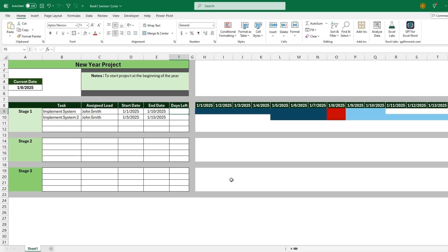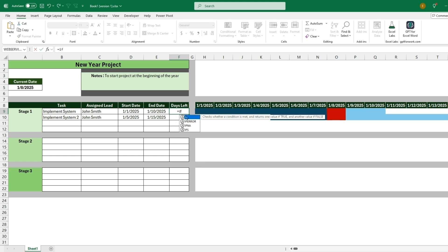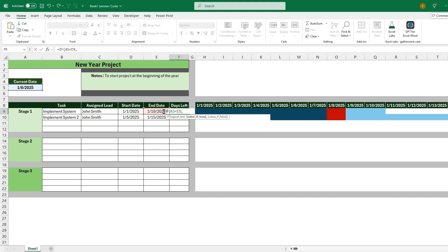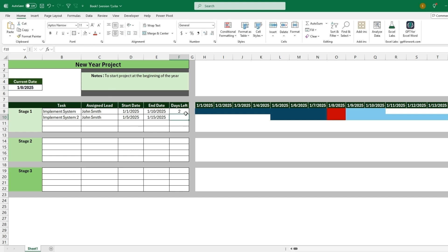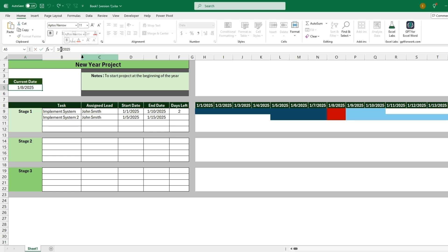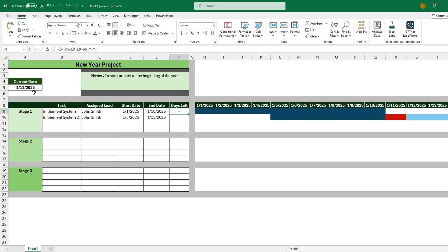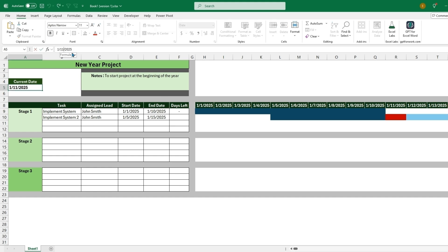So now adding in the days left, this will just be an extra field. We could type equals IF. And so what this IF will check is a logical test that if the current date is less than the end date, the value will be the end date minus the current date. And then if that is false, we can add in double quotes, we can just do a dash, which is just saying that there's no days left. So let's say we change this to the 11th. We can see that now there's a dash just saying that the current date's already past the end date.